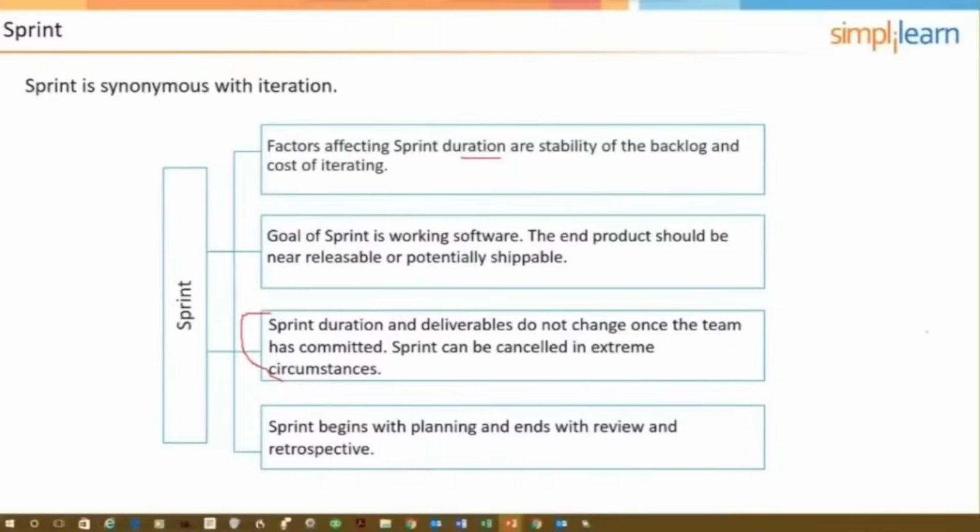Is the Scrum Master going to be there? Likely as a facilitator. Is the product owner going to be there? Maybe, maybe not. If the product owner is there, the product owner could maybe answer questions and help clarify. But the product owner does not weigh in on what went well, what did not go well, and what are we going to do differently. That is all owned by the team.